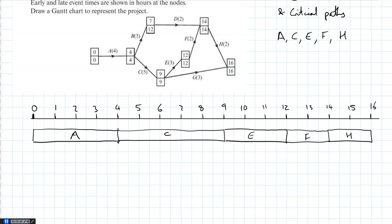So a critical path gets its own line. If you have another critical path, it would get its own line as well. If you had another critical path which has A in, so say it had A, and then the next critical path went D something, and D started at four, then you could have D here, and then the next one after it, the next one after it. Obviously, it would only go up to 16. So you can do that as well. If a critical activity is in two critical paths, then you don't draw it twice. You only ever draw any activity once on these diagrams.